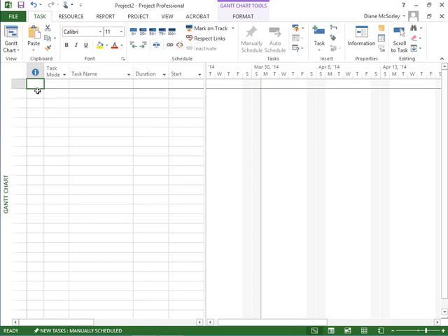Yeah, what is the total amount of dollars you're managing? What is the total duration of all your plans? I don't know. I'll have to go look that up. Well, what we can do is we can create a master project and pull multiple plans into a master project and have that information in one place to manage it.